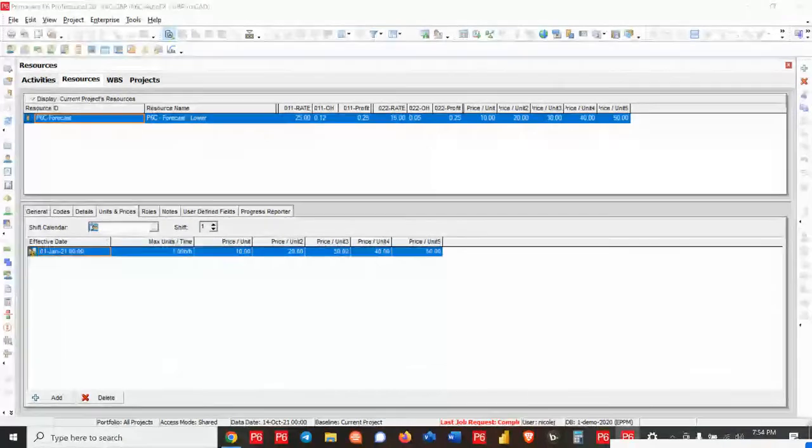We've got percentage with different factors to roll up automatic costs. We've got calendar creations, automatic calendar creations for some of our clients, especially our rail clients, where they want to make sure everyone's off the track. So they get a time window when trains are coming through.